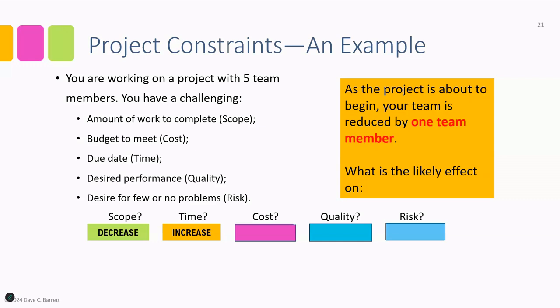And you can't pay them overtime or have them work longer days or bring in a contract employee or outsource something. You can't, because you can't affect the budget and so on. So it's going to likely take longer, or that's the pressure that will be on.